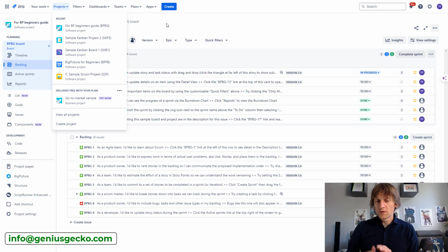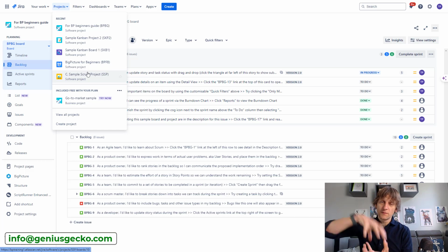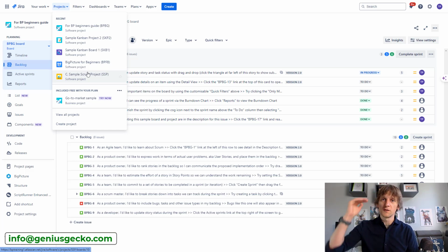The difference, though, is that whereas Jira projects allow you to have only a flat structure, BigPicture boxes can be grouped into hierarchies. So you have boxes inside boxes on top of other boxes, and that's why you can build portfolio, program, project, phases in the project, like program increments, for example, iterations. You can build separate boxes for teams, separate boxes for management views, separate boxes for Agile view, separate boxes for hybrid view, and so on, right? So that is where the power lies.